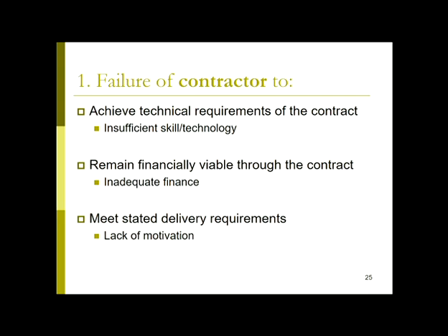Another thing that the contractor needs to do is to remain financially viable through the contract. Now, you can help with that in the writing of the contract. It's unreasonable to expect that a contractor who may be involved in a project for a period of a couple of months to several months can get from the start to, say, 6 months down the track without being paid.